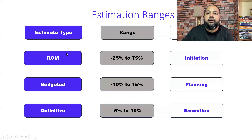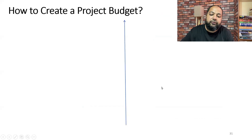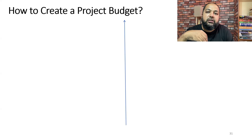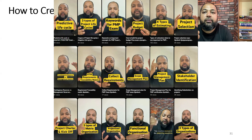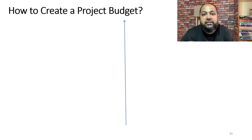As a summary of estimation ranges: ROM estimate is used in the initiating phase with a range of -25% to +75%; budgeted estimate with -10% to +15% is used in the planning phase; definitive estimate with -5% to +5% is used in the execution phase. That's about estimating cost. In the next video I will cover how to create a project budget. Please like, share, and subscribe — I also have a series of 100+ shorts on YouTube covering PMP examination concepts. Best of luck for your PMP examination!